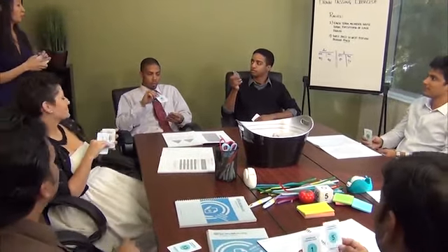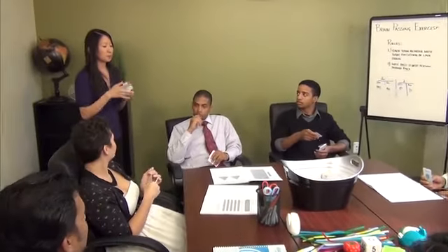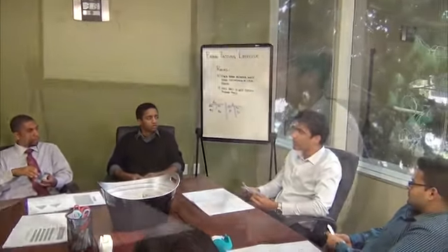All right, so the way this works is the people who had the highest estimate and the people who had the lowest estimate explain why they chose that. The highest number given to the horse is 13. So the people who guessed 13, why would you say it's a 13? The participant who assigned this number says that in relation to an elephant, which he would assign a 21, a horse would be a 13 in size according to him. All right, how about a few people who guessed low? Who had the 5? You both had 5. Why did you guess a 5?